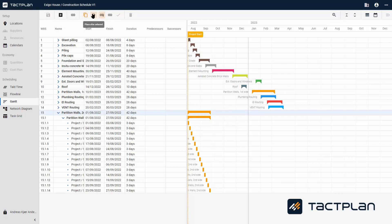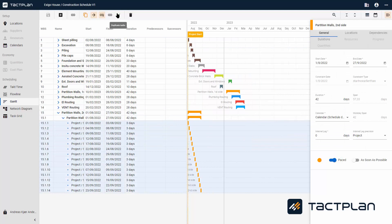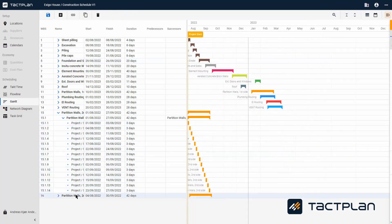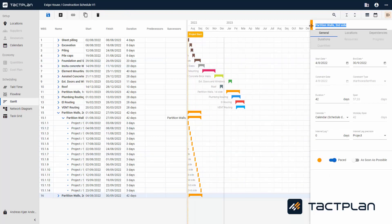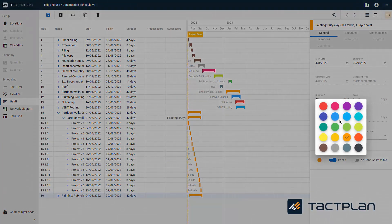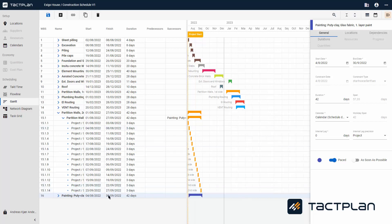The next task has the same location as Partition Wall Second Side. In that case, you can click Duplicate Mode. Then you can decide where the task should be placed in relation to the one you are duplicating. You can also decide if it should have dependencies for the task you duplicate or the same dependencies as the one you are duplicating. Once selected, click Duplicate Task and there comes a task just like it. Here we change the name to Painting, Putty Clay, First Layer, Paint — the more specific you are, the better it is. Now go down and change the duration. It says 42 days and this is what we need, so we don't change it here. Remember to change the color of the activity — we change it to blue. Then please remember to save.